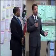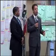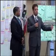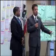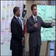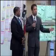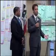Okay, so that's a good question. One thing I didn't mention when I stated earlier that we did a noise and vibration study, I should have been clearer that we looked at both conditions. We looked at the construction condition, and we took what we considered to be the worst case scenario, which was exactly what you said, the shoe fly. And we made even more conservative assumptions than that, because we took the worst construction case and assumed it would happen corridor wide, which obviously won't be the case.